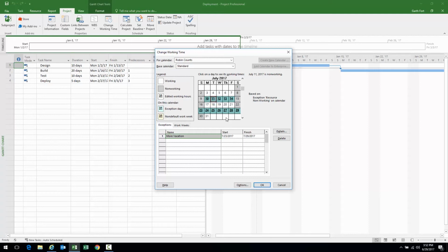We demonstrated doing it via the timesheets, and that would be a mechanism where you would utilize, if your organization is utilizing timesheets, operational activities that are in your timesheets. Team member would submit, somebody would approve, and then the calendar exception is already created. The other mechanism would be if you're not using timesheets, or for some reason your organization does not want to submit the calendar exceptions via the timesheets, you would go ahead and do it utilizing the method I just showed. Check out the resource from the Resource Center, open the Microsoft Project, make the changes, and then close and save the enterprise resource pool.